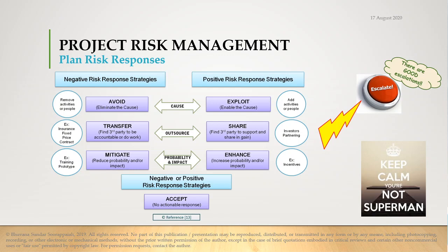And in escalation, communication is very important. How early you escalate, how well you articulate your escalation, how proactively you are doing it, how effectively you are giving alternatives. You are not just going to go to your management and say, sorry, my job is done, PMBOK 6 says escalation is good, I am escalating. No, you are going to clearly articulate what the problem is, what steps you have taken so far, why they have not been effective, what different alternatives are available, why it cannot be done at your level, why it needs management support, what the management could do, and by what time they have to take a step so that the risk response is effective. All these things together make up what you call escalate.